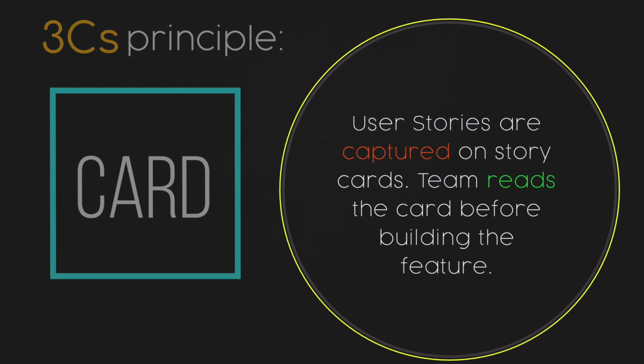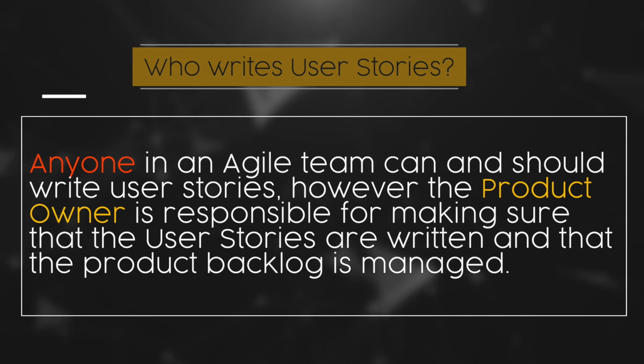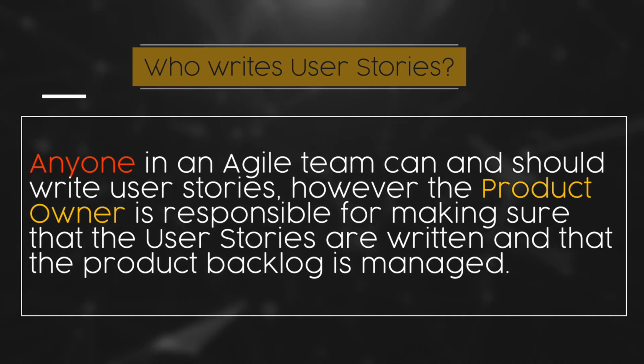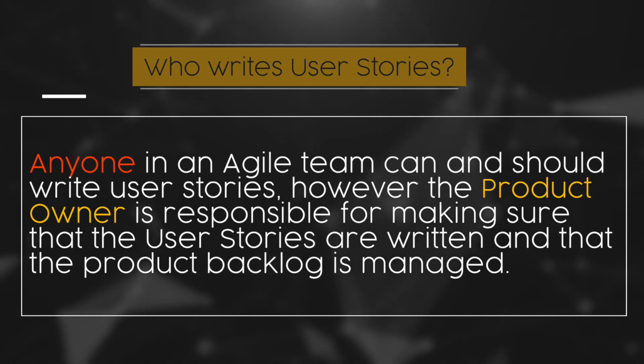Finally, card. You should know that user stories are captured on story cards, and the team reads the card before building the features. But who writes the user stories? Anyone in an Agile team can and should write user stories. However, the product owner is responsible for making sure that the user stories are written and that the product backlog is managed.